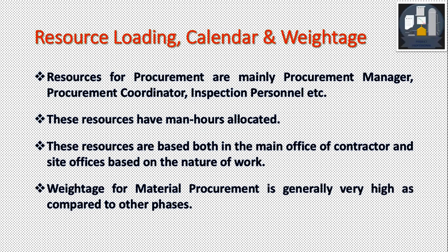Then we have the weightage for material procurement, which is generally very high as compared to other phases. Engineering has generally the least. Material procurement generally has the highest weightage, and construction has the second, in between engineering and material procurement. But compared to engineering, the construction weightage is quite high.